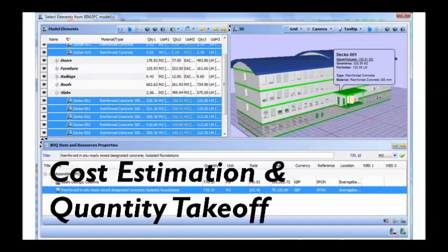Then that's a chance for you to swap out that material for a different one during design development while you're still making those design decisions, so that you don't get to the end of the process in construction documents and then realize you've designed your whole structure and your whole scheme around something that is just going to be too expensive.